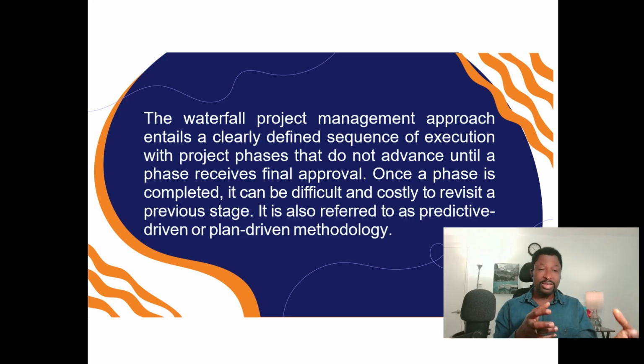Not that we can embrace change or we can take change, but it will have to pass through the change management process, through the change control board. So the change control board are the people that will approve or disapprove our change. So in Waterfall, it's always good for us to get it right from the beginning, so that we do not have to go through a change request process.